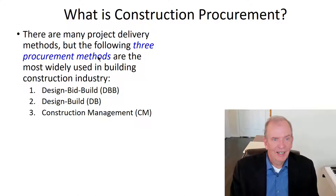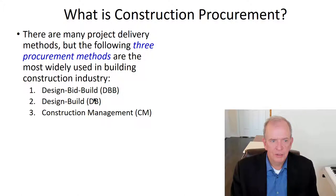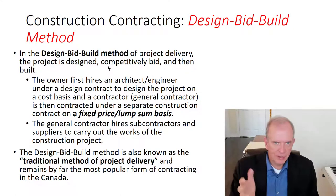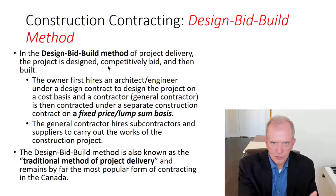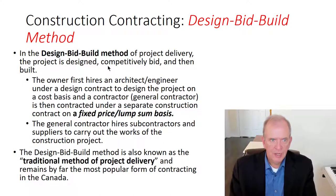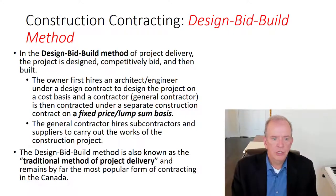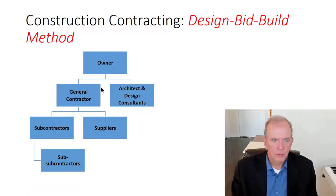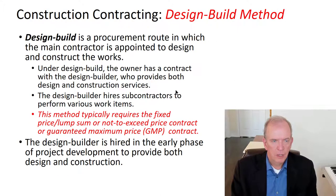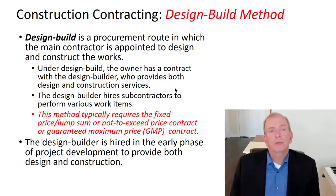There are three main procurement methods: design-bid-build, design-build, and construction management. Design-bid-build is the traditional lump sum approach — the architectural firm designs it, GCs bid on it, and then it's built and monitored by consultants acting in the client's interests. It's a very traditional method of project delivery.